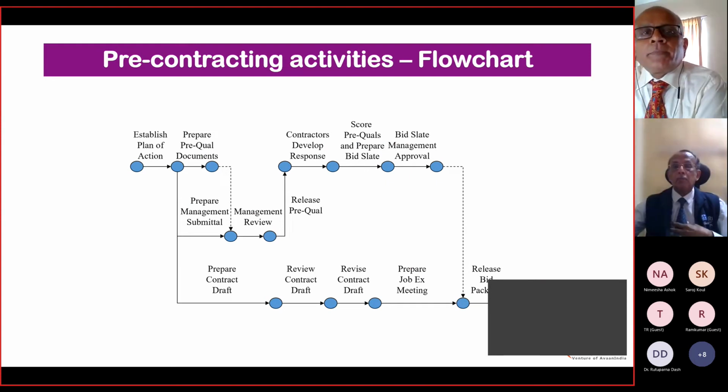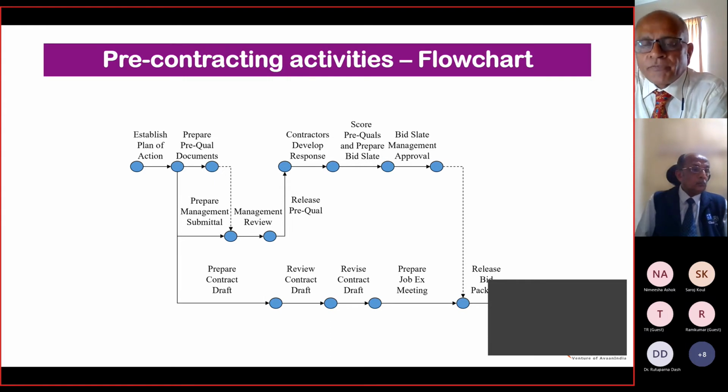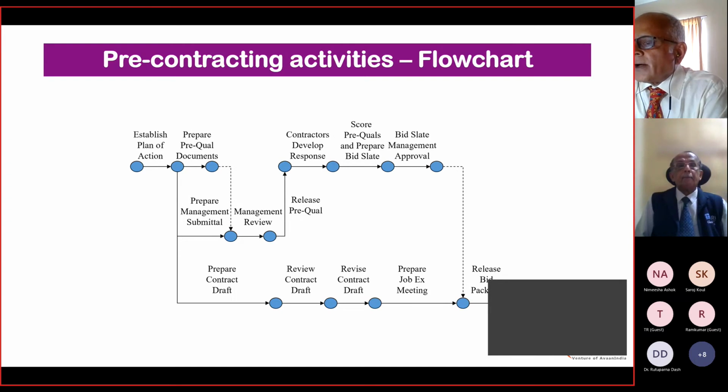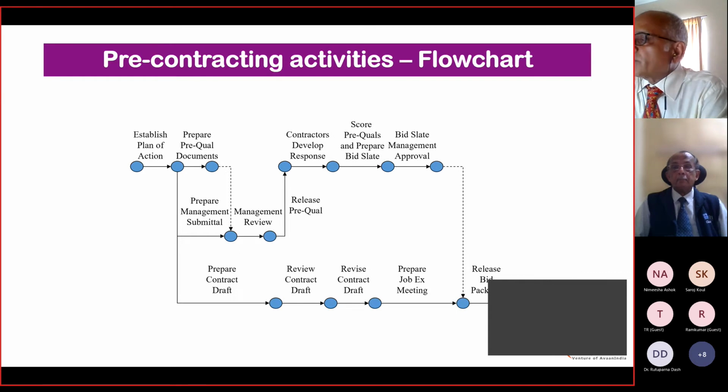Perfect. So once you have done the pre-qual, it's now time to sit down and design and decide what you are going to do, what steps you are going to take before you release your RFP to a contractor or a set of contractors from whom you will choose who you end up working with, and how you go about the entire process. So you start with establishing a plan of action, what all is required. And this would be with the entire buying organization, various people who are there on the contract management side. You prepare a pre-qualification deck or document set.